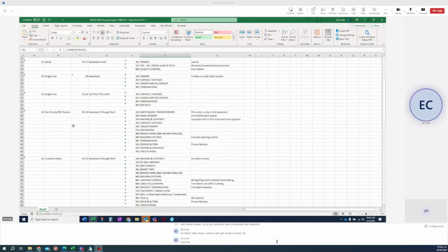So the basics is, again, the area just defines whatever you want to define. However you break down your work breakdown, it just breaks down into areas. It's just a placeholder. So in this case, area 04 means nothing, but we assign it to the electrical room. So now it means something.